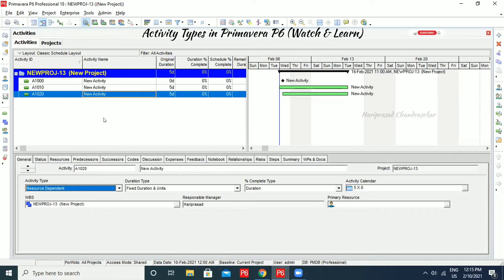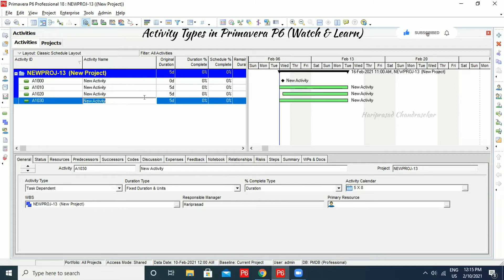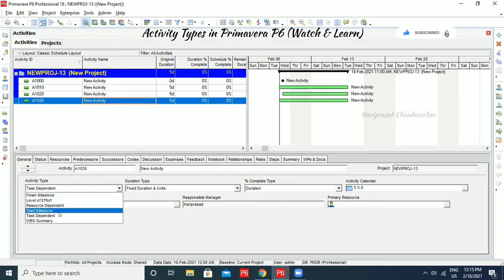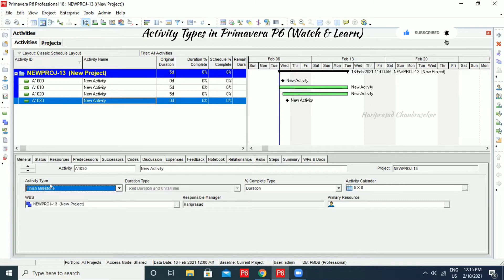Now I am going for a Level of Effort activity. But before that, I'm going for Finish Milestone. Finish Milestone is the same as Start Milestone, but it is typically used to mark the end of a project. It can have a finish date — Start Milestone has a start date, and End Milestone has a finish date.